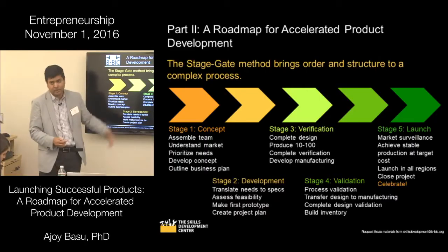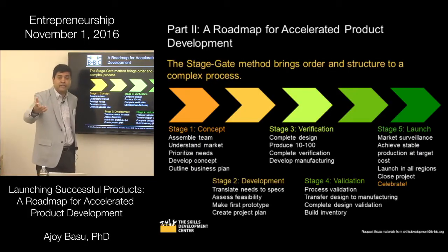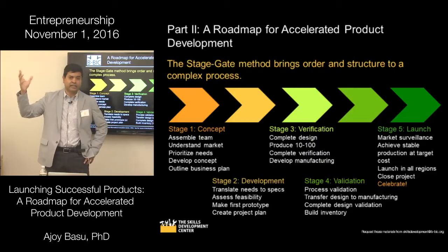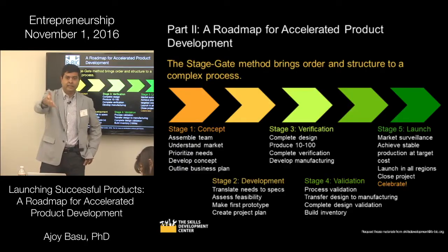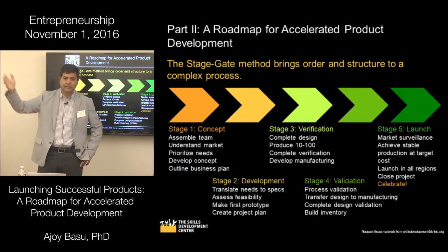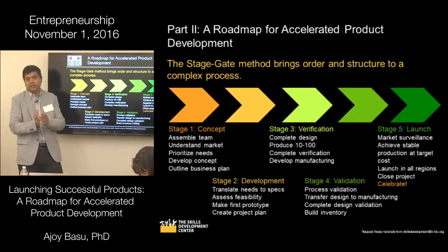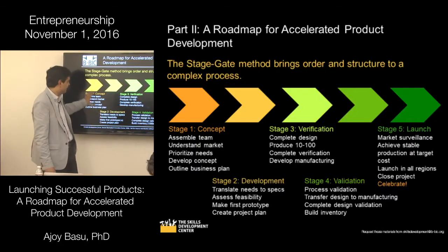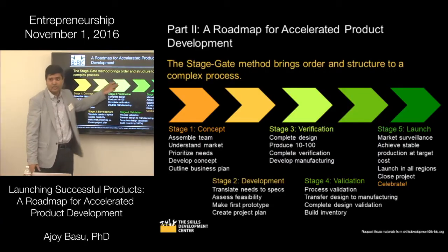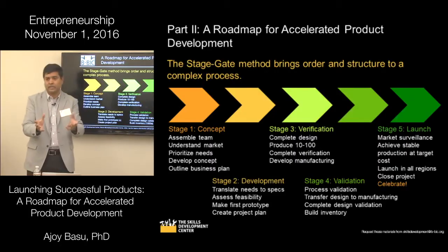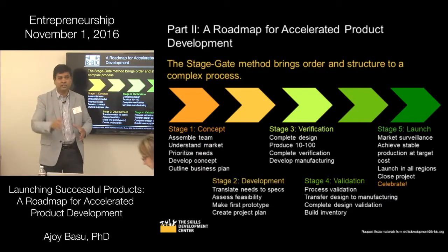So this stage gate approach is also useful. For example, when you go and try to get funding, let's say you have an idea of a product and you say, you know what, this is going to make $50 million, give me 10 in 3 years, right? Now, that is an ask, right? But if you break it up into small sections, you sort of say, to concept, usually the money increases, right? You say, this is my vision of the product to make, do some market research, etc. I just need to validate my assumptions. I need $500,000.